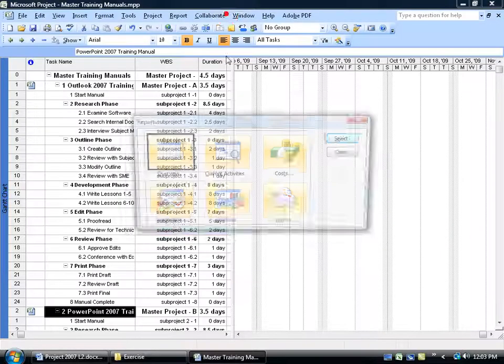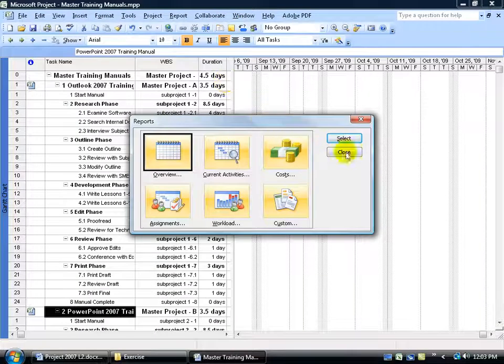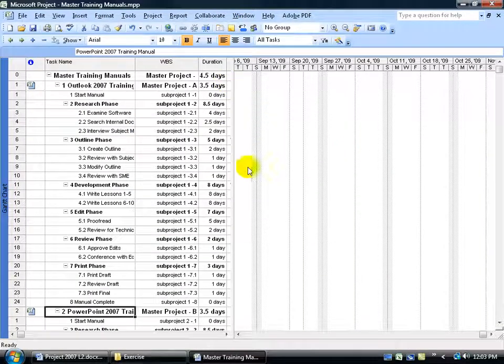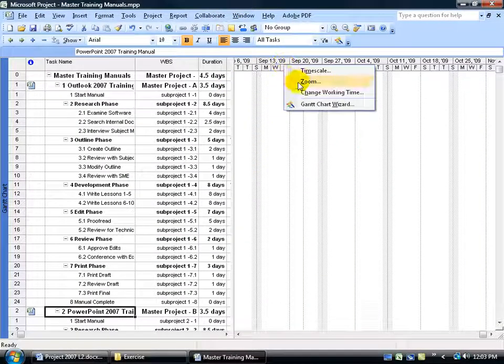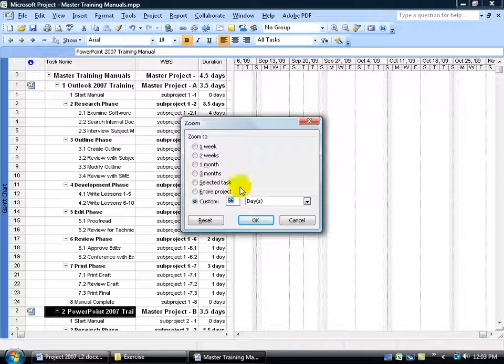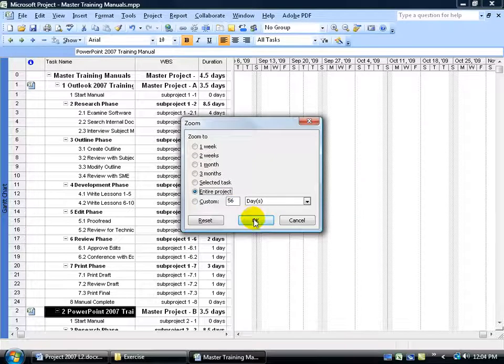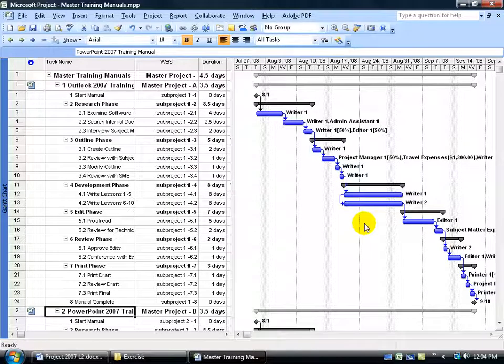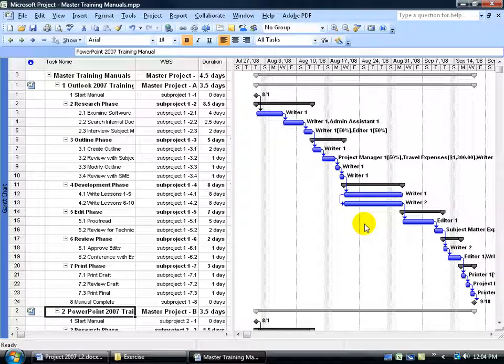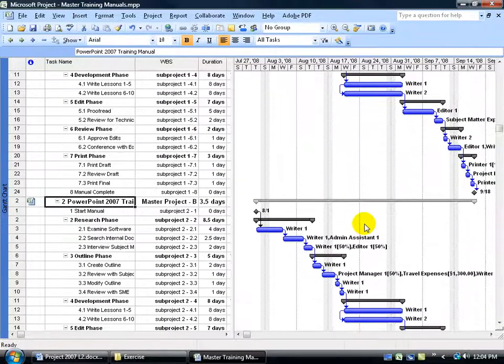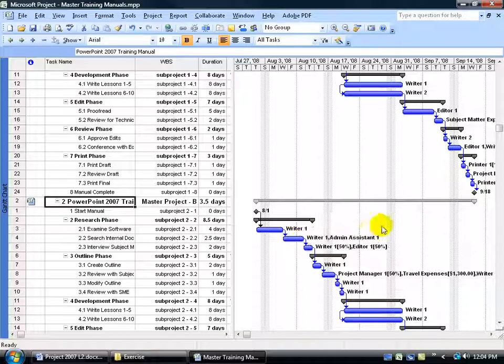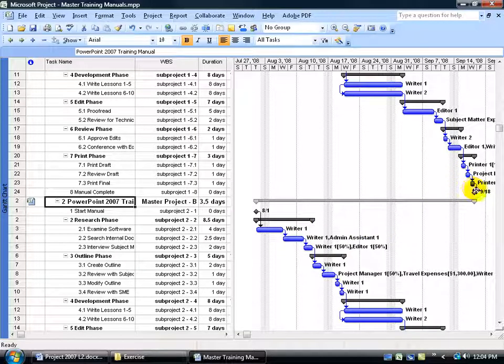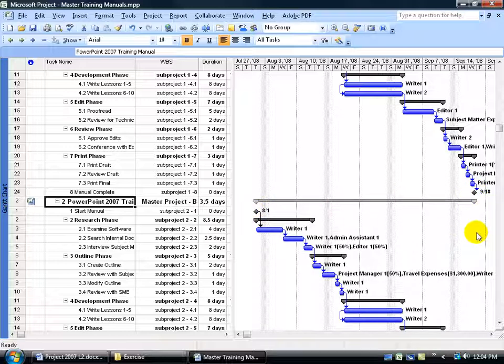Let me come up here and close out of here. Close out of there. And I'm going to come up here and right click to zoom in so I can see my entire project over here in the Gantt chart. And what you can do here is that I can go ahead and link this project up to this next project and continue on. If I link the last tasks here to the beginning of this task, it's going to push this out. Now remember, what you do in the master is going to affect the single project files. But I want to show you that you can do it.